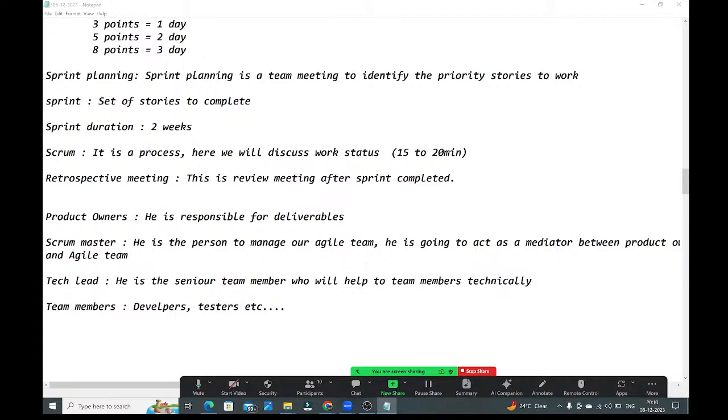So if we want to make any changes, we should have proper documented confirmation. Then only will we go for the changes. Why? Because if they say verbally to do those changes and we proceed, tomorrow they may forget, and when I told them to change this, they will question us.